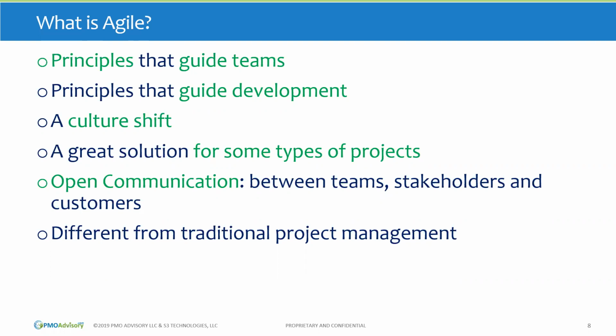Let me give you a very simple example. Say your organization, especially if it's a more hierarchical organization, takes roughly a week to make any big decision. Take Scrum, for example. Scrum has a 4-week sprint, and decisions most likely should be made the same day or very quickly, in a day or two. That cultural shift demonstrates the problem with an organization implementing just Agile. Because if it takes a week to make a decision, there's not a lot of agility. If you only have a 4-week sprint, and a lot of Scrum sprints are shorter, then obviously taking a quarter of the time just to make one decision can be an issue. So that's part of the cultural shift.